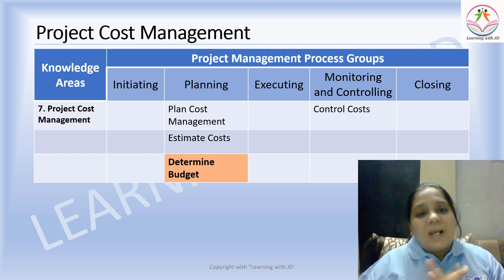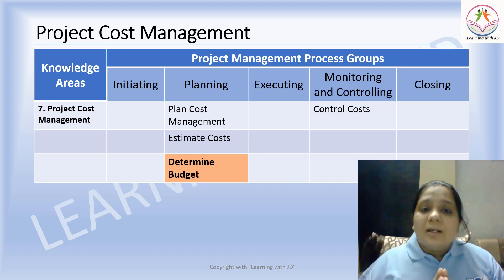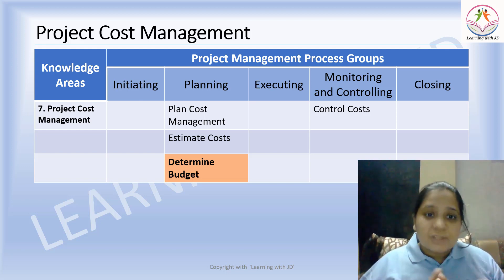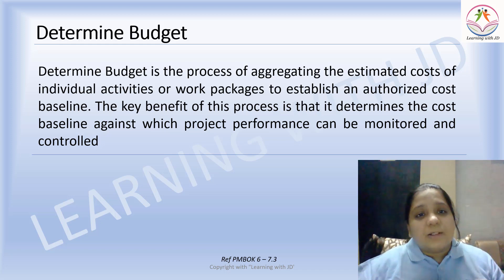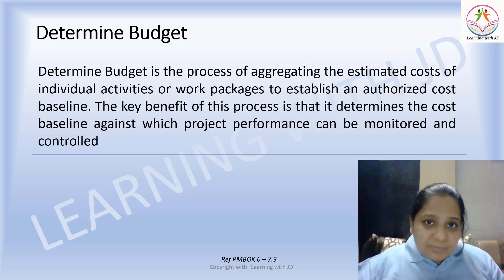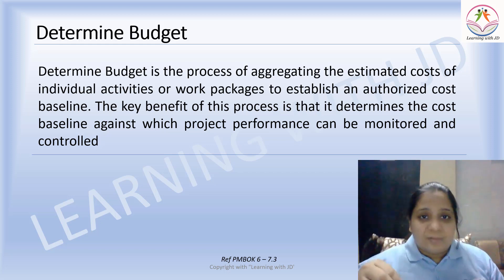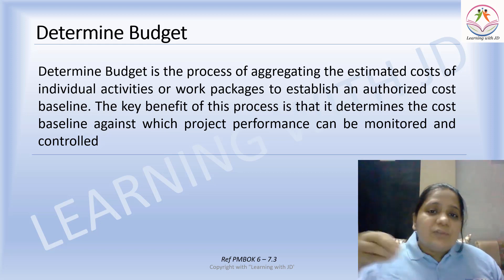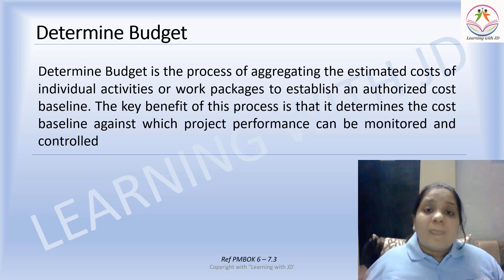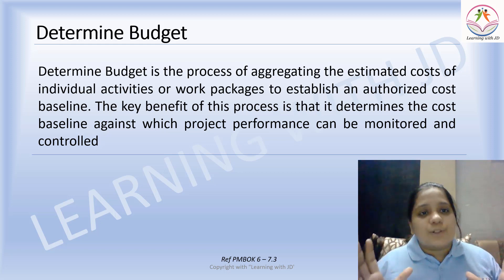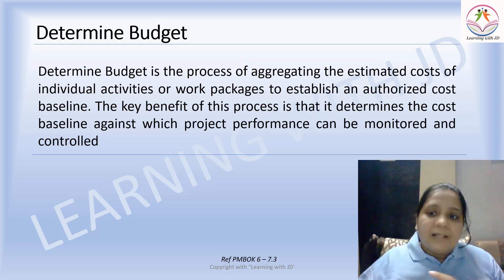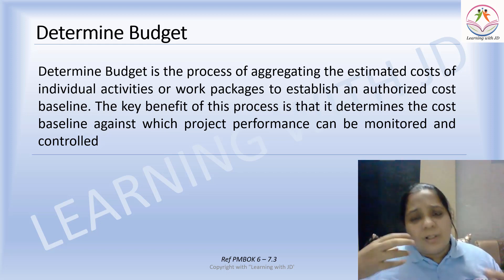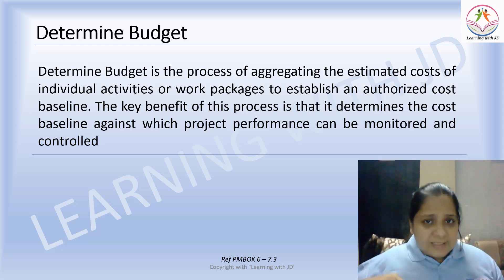Planning a cost and estimating the cost are part of the planning process group, and determining the budget is also part of the planning process group. Determining the budget is the process of aggregating the estimated costs of individual activities. In the previous video we estimated cost at an activity level, not at a project level. Now we have to aggregate all these costs at an overall level and add certain more considerations to determine our budget.